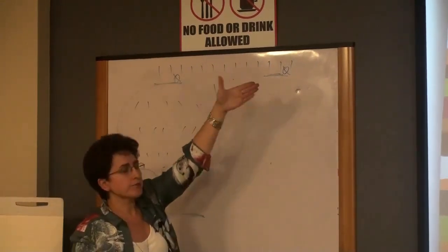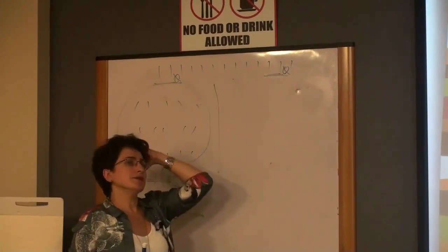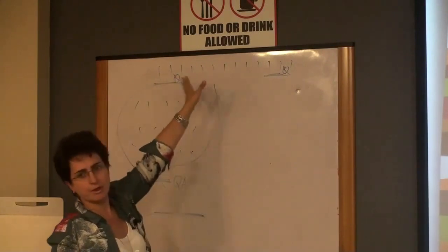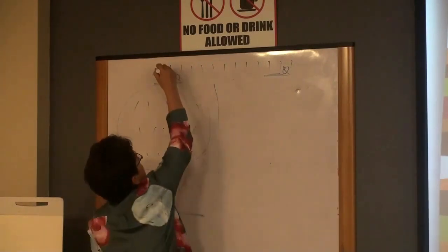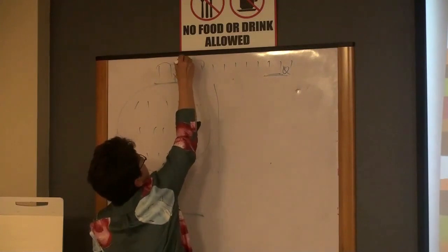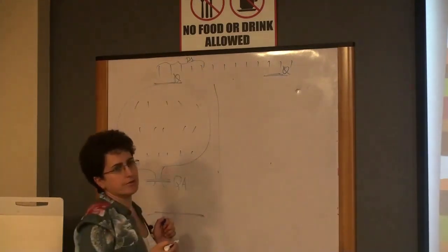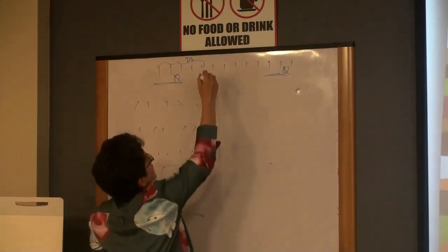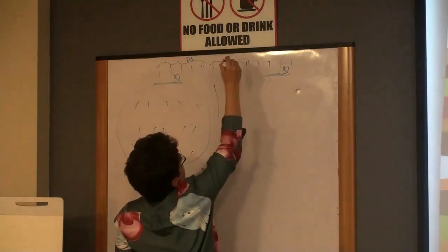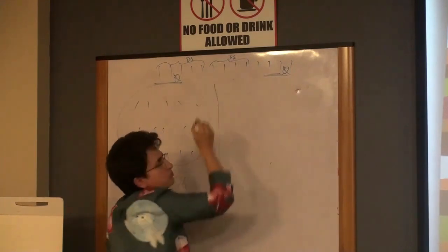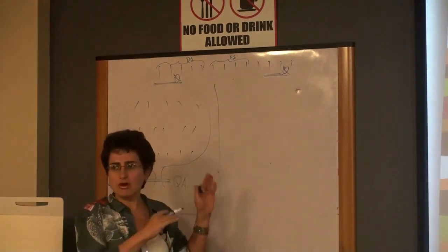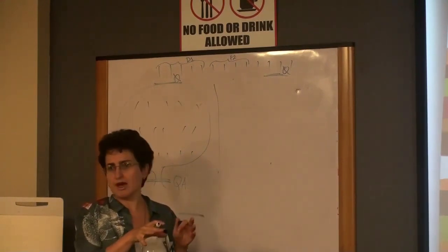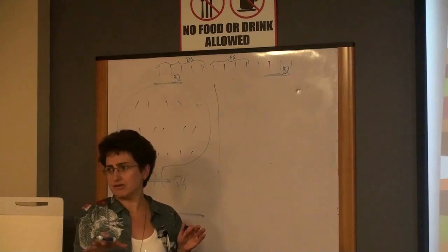So if you have 20 requirements, you can sit in a room and prioritize all the requirements and say, okay, out of 20 requirements, we have, let's say, 5 requirements which are P1, which means high priority requirements. Unless we implement those, we cannot release, right? And then we have another 4 or 5 features which are kind of P2 priority, which means if you do not do those, we can probably still release.